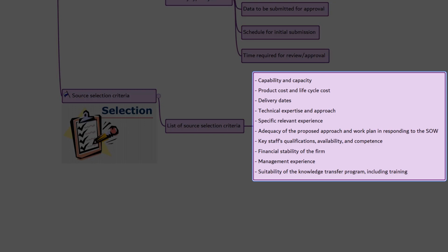For international projects, evaluation criteria may include local content requirements. For example, number of participants by nation in the proposed key staff list. The specific criteria may be a numerical score, color code, or a well-written description of how well the seller satisfies the buyer's organization's need. The criteria will be part of a weighting system. It can be used to select a single seller. The document may also contain details to sign a contract and establish a negotiating sequence, seller selection method, such as ranking by weighted evaluation score method, etc.